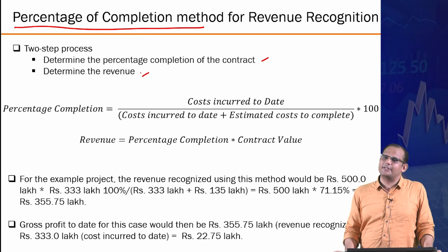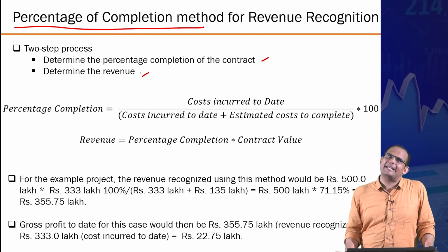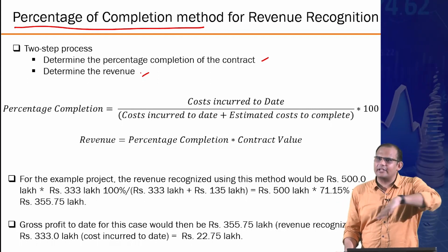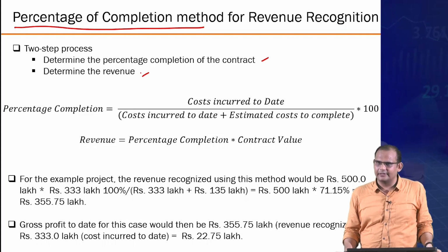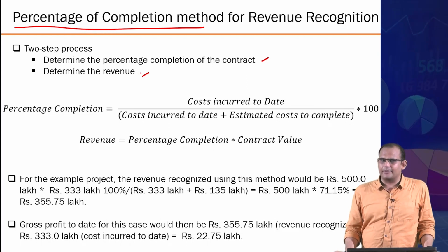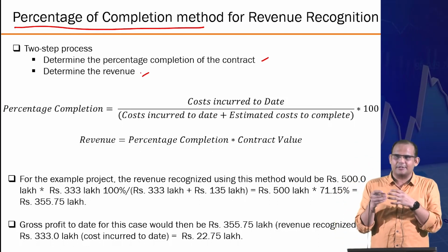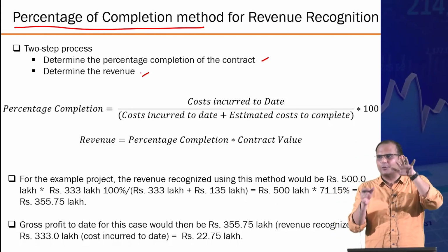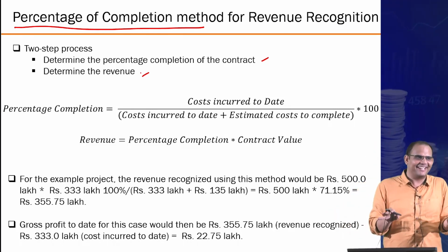Milestones. What are the milestones? Phase completed, as in like the foundation work is done, now the pillar work is done and things like that. Yeah, could be the way, because typically there's a sequence of activities in construction. That is, you know that you can put pillars only when the foundation has been done. Ideally, that's the kind of world we are living in right now.